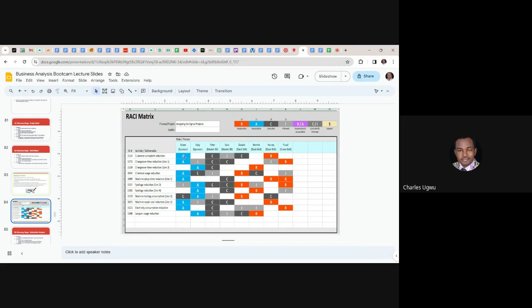And the person accountable makes sure that if this particular action needs to be performed at this time, it delivers, because if it isn't performed, it might start affecting other activities if these are on a dependable basis.